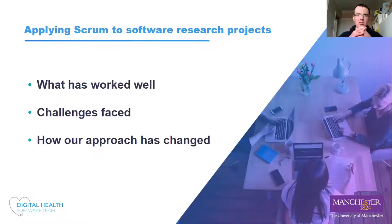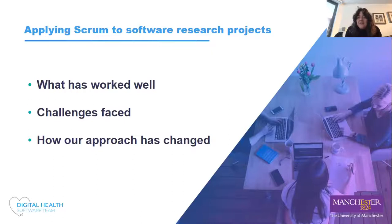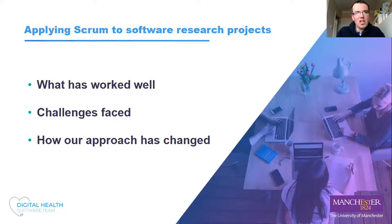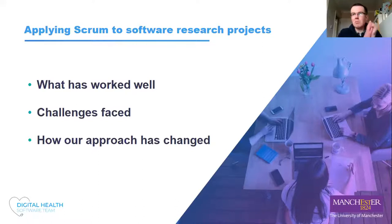A question from Manuel: what's the minimum number of people you need in a team to apply Scrum efficiently? The guidance is about three to seven for a Scrum team. If you've got less than three, there's a question of who fulfills all of those roles. Less than three probably isn't the most effective way forward, though I'll talk about the challenges when the team is smaller as we go on.